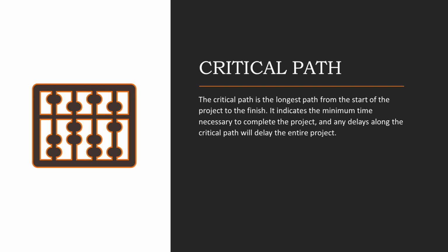Critical path is the longest path from start to finish of the project. It indicates the minimum amount of time that is necessary to complete the project, and any delay along the critical path will delay the entire project.